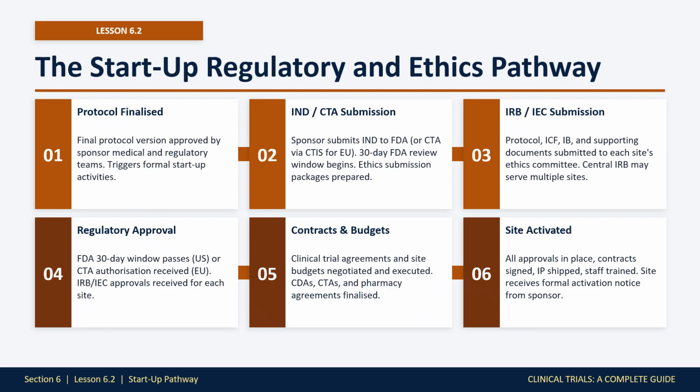Step 4. Regulatory approval is received. Either the FDA 30-day window passes without a clinical hold, or an affirmative CTA authorization arrives from EU regulators, and IRB approvals come in for each site. These often arrive on different dates, meaning sites activate at different times.